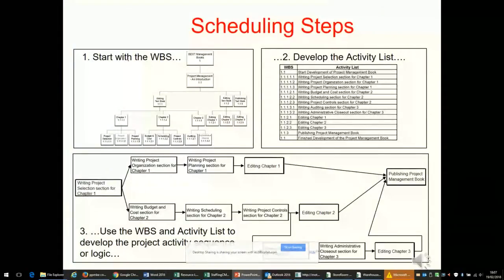So in the planning phase, we could start by defining a clearly laid out work breakdown structure, very much like an organogram. What are our key work packages? How are they all linked together? And in the earlier stages, it could be done at a macro level. So we do not go into very micro details, to allow for some abstraction, and we just plan at the higher stage, and then we could have maybe micro schedules for each component of our project.